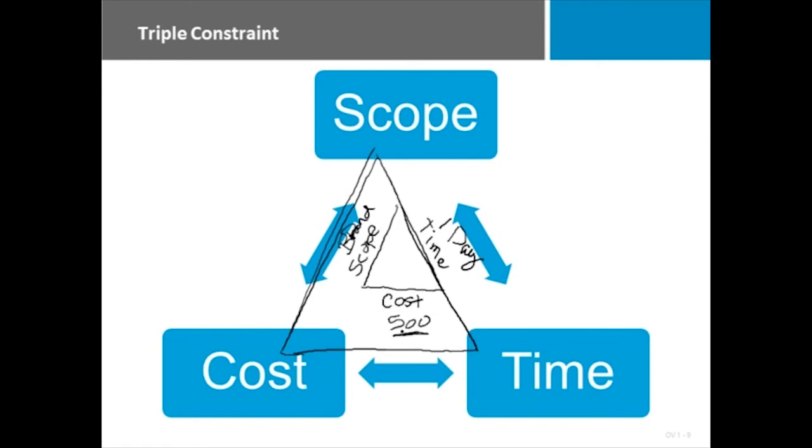If somebody says they're going to increase the cost, there's going to be ramifications. Probably the scope is changing, the cost is increasing because they've got more to do, they determined that we forgot some step in the process, something like that, and it's usually going to take more time.